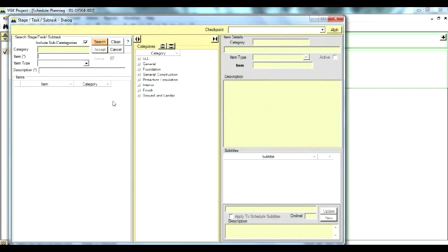Now you're able to choose a new item from a list of your typical items. So despite differences between projects, you will have similar items which repeat from project to project. From our experience, we assume that most of your projects consist of typical items, with the difference being in the combinations of them. From your experience, you can identify and compile your own list of typical schedule items. We use these typical items to compile our schedules, which improves their consistency, their readability, as well as speeding up the planning process. Find your item using the search button.